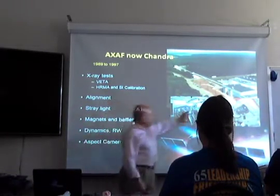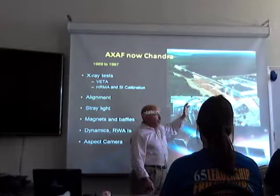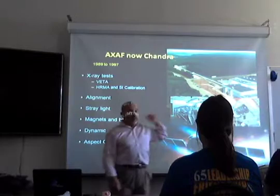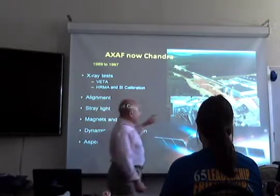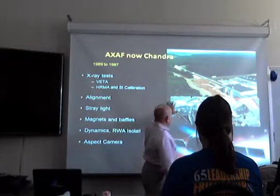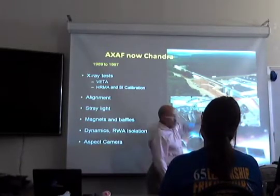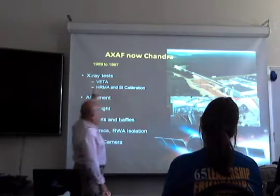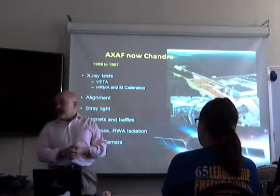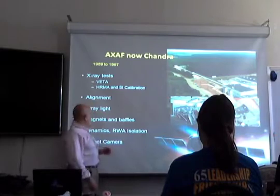So Congress said, you must prove that you can build the outer two, the hardest two mirrors, by September 15th, 1991 at midnight, or if you can't do it, no program. We delivered the data on September 4th. It was a very close run thing. If you look carefully, the clean room here, which is the same clean room we did the mirrors in for Webb, has plastic sheeting. So we developed it. Soon after that, they said, well, we don't have all the money, and that's when we changed from serviceable and multiple generations of instruments to the final configuration.